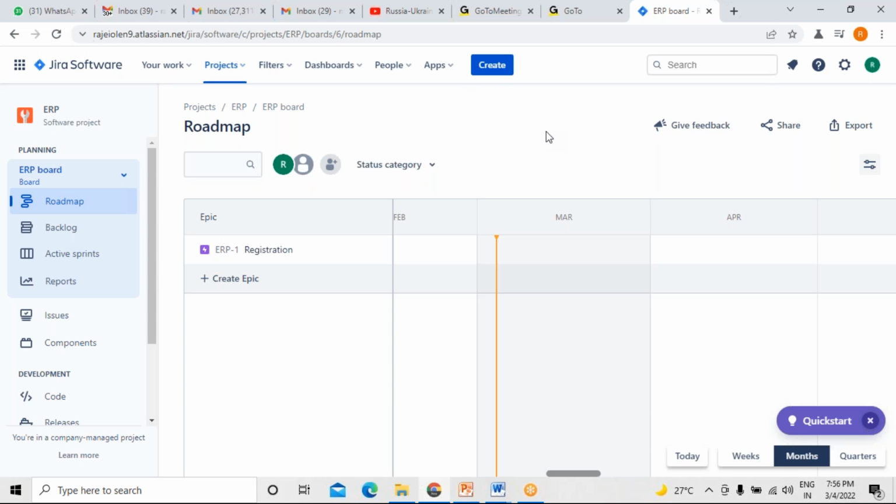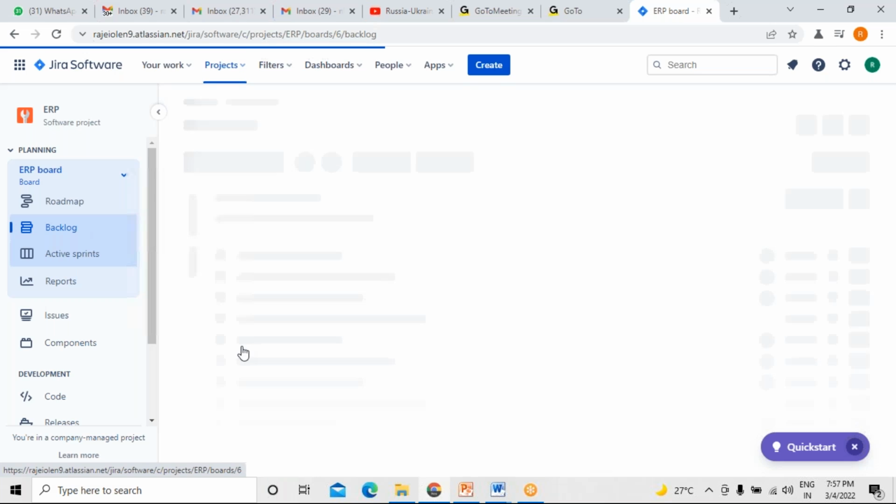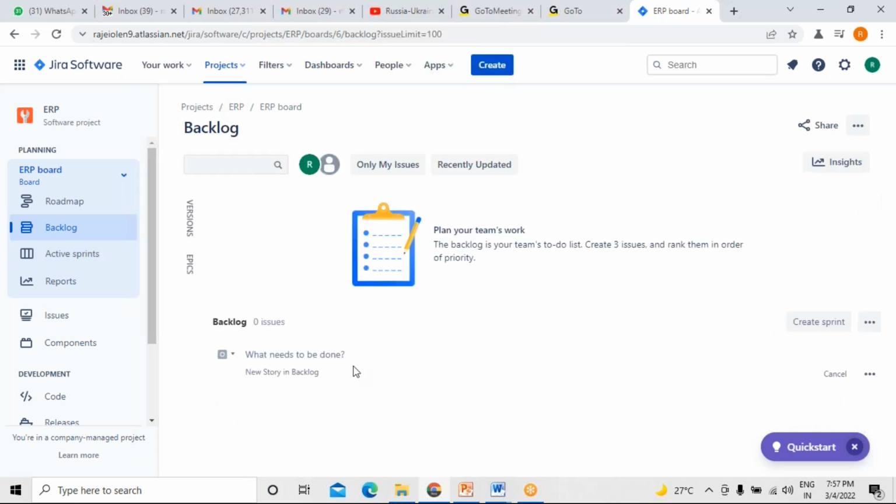Keep on changing means, see, it won't change. You are doing add-ons, that's it. You are not changing anything. You're adding more functionalities, right? So the mobile-enabled user story, you're adding it. Whenever you add, what will happen? Again, it goes to the product backlog, and product backlog refinement takes place. Whenever product backlog refinement happens, if it is required, we can plan it in the next sprint. In the second sprint, we can plan that.